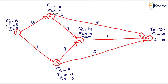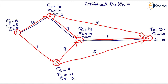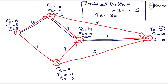Now we will draw the critical path, which is 1→2, 2→4, and 4→5. The critical path passes through nodes 1, 2, 4, and 5, and the completion time of the project equals 30. That is the complete solution of this numerical. Thank you very much, students.